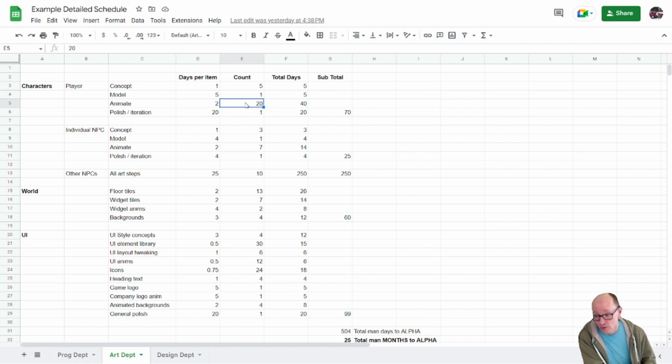So, stand still, walk left, walk right, run left, run right, jump, fall, die, hit, all these things. There's going to be 20 of them. So we're going to spend 40 days on animating. And then polishing and iteration, we're going to just say, all right, 4 weeks of polishing and iteration. So we're going to be making the animations look nicer. We're going to maybe go back and tweak the model a little bit. We got 4 weeks for whatever we need to do. We're just going to do that one time, so 20 days.